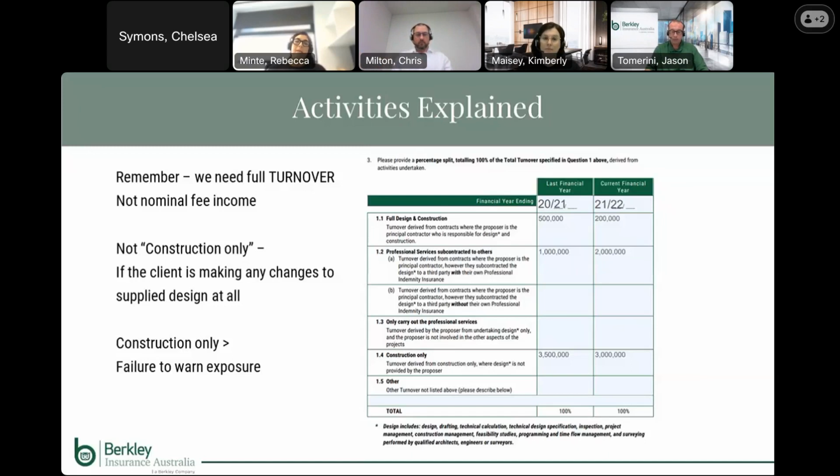Liquidators did highlight at the time that there was a massive issue in Porter Davis's practices, and that was that they were delaying the purchase of homeowners' building insurance until after work permits were secured, as opposed to placing those policies upon receipt of the deposit from the homeowners. This practice left about 800 customers unprotected, having paid deposits before that insurance was actually in place.